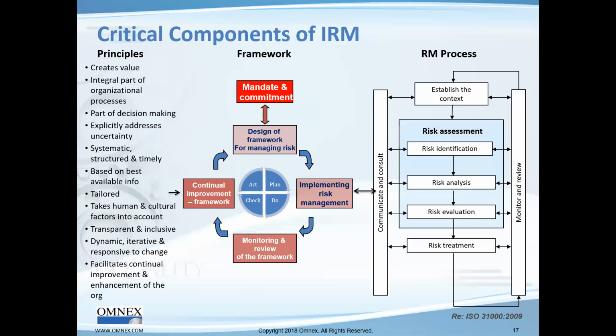Then we've got to do the risk treatment. Once we have the treatment, then we monitor and review. Part of the risk treatment is to say, what is that residual risk? Is this treatment going to be sufficient, or do I have to go back up to the analysis portion? So I will do an iterative approach.